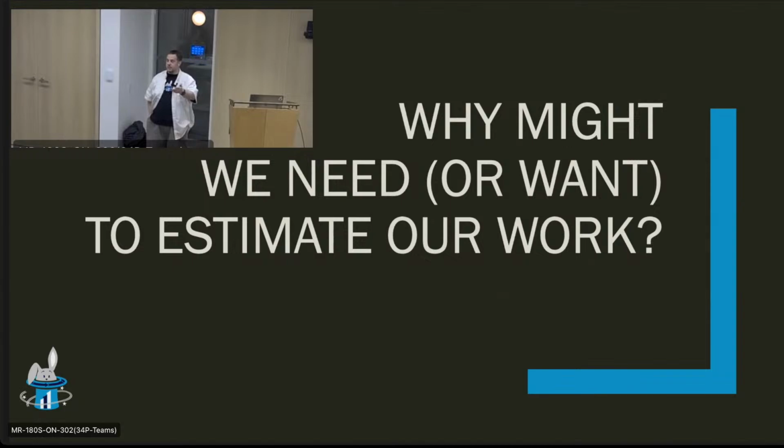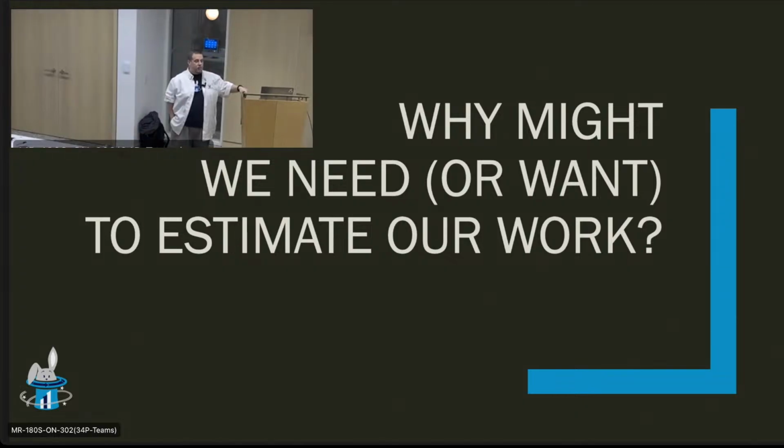And when I say we, I had absolutely nothing to do with this except that I facilitated the conversation. The development team was able to get a pretty good sense of how long it was going to take to do this work, and they did it in 7.5 minutes. Now, could we have done more analysis? Sure. Would that have made it go any faster? Probably not. The interesting thing about estimating and deciding whether to do something is that it was 4.5 months from when we started. If we had done a month of analysis, it would have been 5.5 months for us to deliver that. Is that the right thing to do or the wrong thing to do?